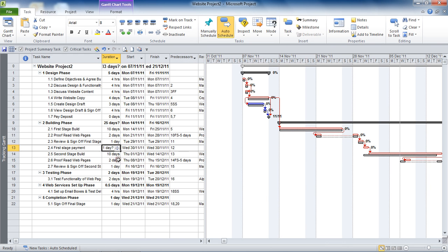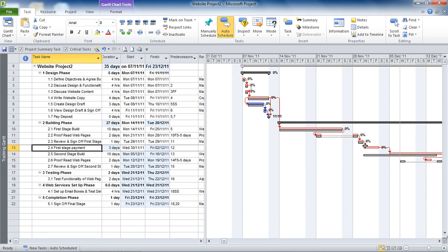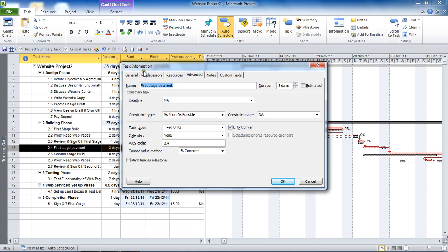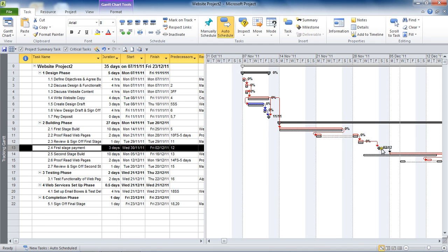This one I'm going to put a duration of 3 days for, so it's a normal 3-day task which has already linked itself up. There it is — 'First Stage Payment' — a normal 3-day task. What I'm going to do is double-click on 'First Stage Payment' to open up the task information dialog box, and on the Advanced tab I'm going to check the 'Mark Task as Milestone' box in the bottom left-hand corner and click OK. That will also create a milestone — a second way of creating a milestone task — but you can see it still has a 3-day duration. You can't see that represented in the Gantt chart, which is why this approach is sometimes discouraged.